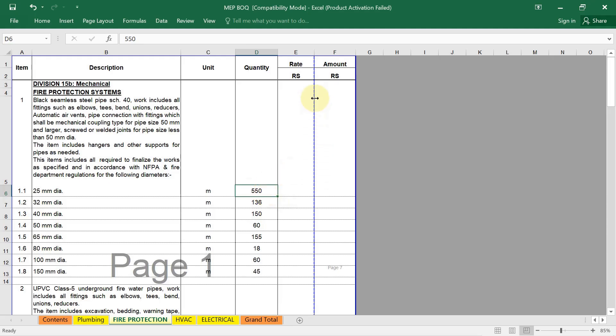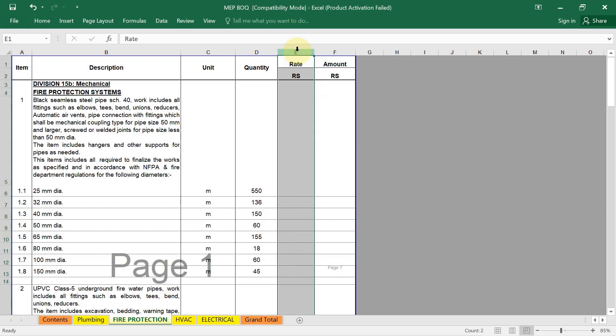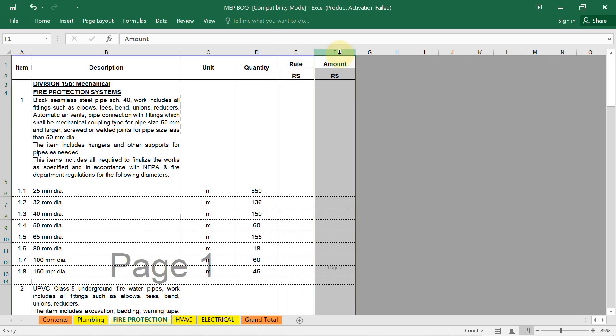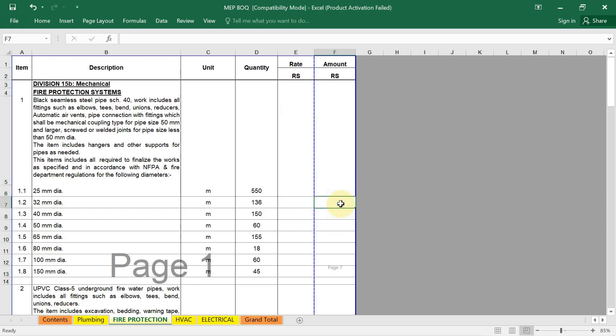In the next column, we have to provide the unit rate for each item. From where you will get the unit rate? This unit rate you have to determine for each item based on the market price, supplier quotes, and historical data. Then finally, the next is total cost or total amount. Here just calculate and enter the total cost for each item. To calculate the total cost, quantity multiply by unit rate, you will get the total amount here.